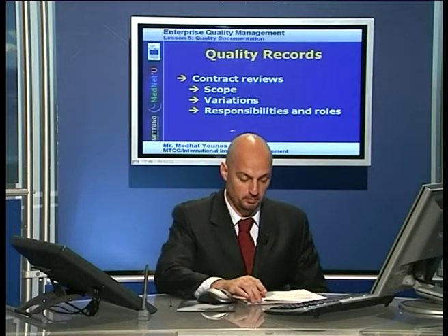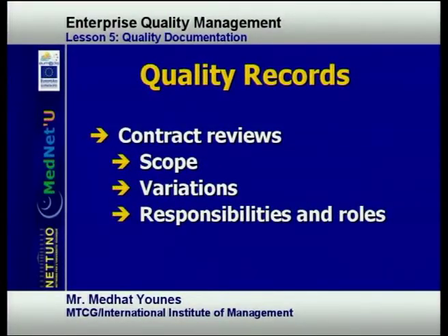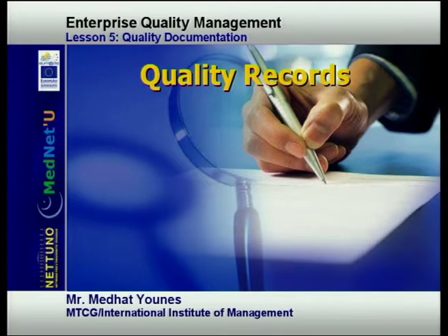Contract reviews should provide adequacy and clarity of the information on the aforementioned scope of the project. It also should clearly identify the acceptance criteria if specified. It should clearly identify deliverables, identification, and feasibility of deliverable delivery schedule.